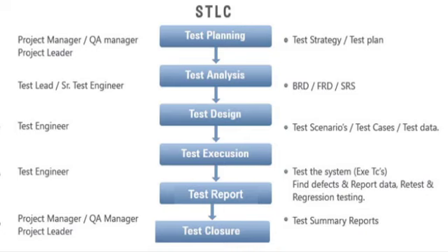In the test closure phase, the testing team will conduct different analyses like coverage analysis, defect density calculation, defect analysis, tester performance analysis, etc. This is the process of testing a software application in real time. This is all about the software testing life cycle.